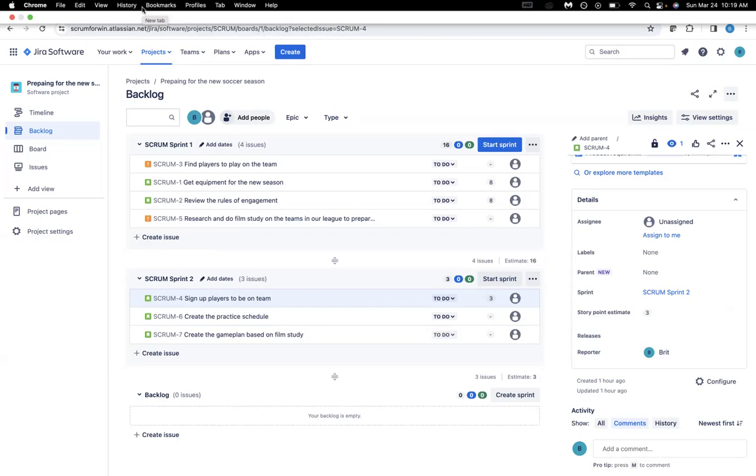You wouldn't have to get too granular into the details, because at the same time, the way we estimate is unique. So 40 story points for us might be 20 story points for another team. So I just stay away from that personally and just say we do it based on historical data.